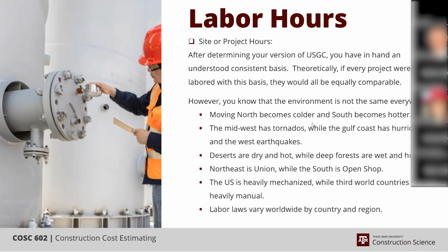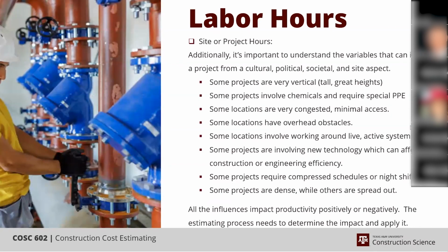In Europe, there's a lot of countries where the standard work week is 34 to 38 hours, and they will not allow you to work more than 44 or 48 hours in a week. It's illegal to work more than that. You have to have some special permit. And when you do, the overtime is 2 times, not time and a half. So there's a lot of different scenarios to think about, a lot of different impacts to your costs.